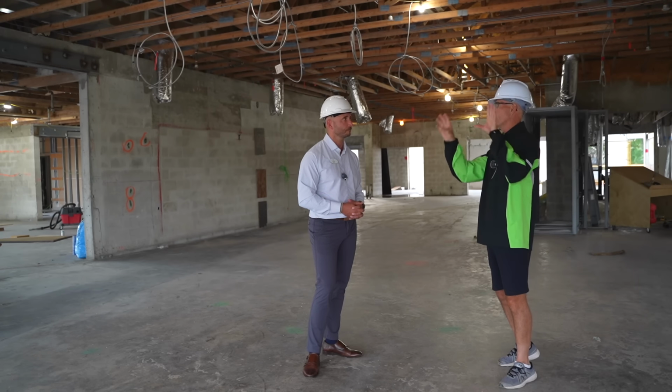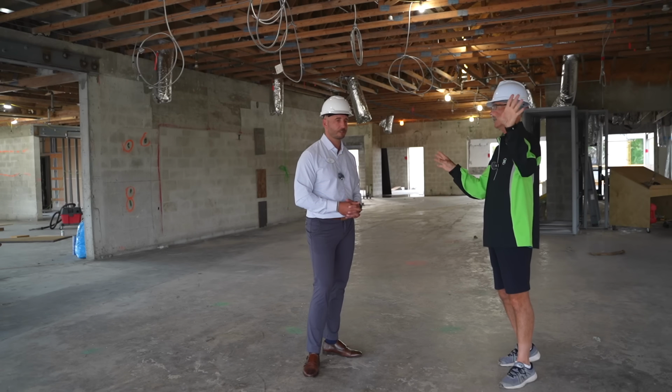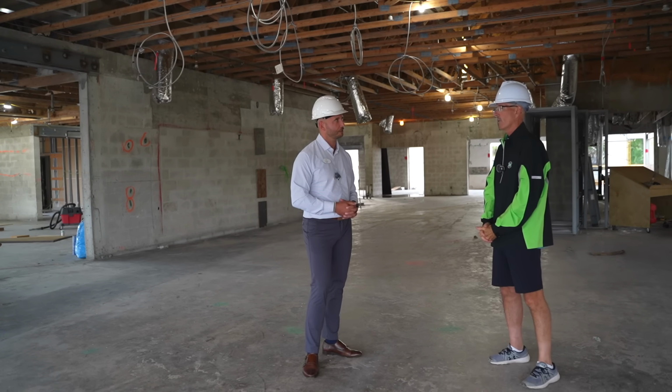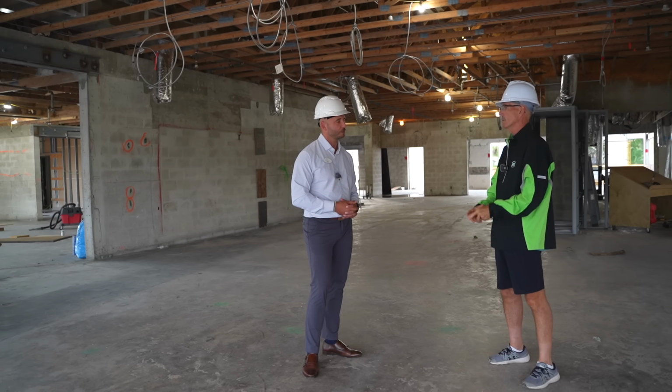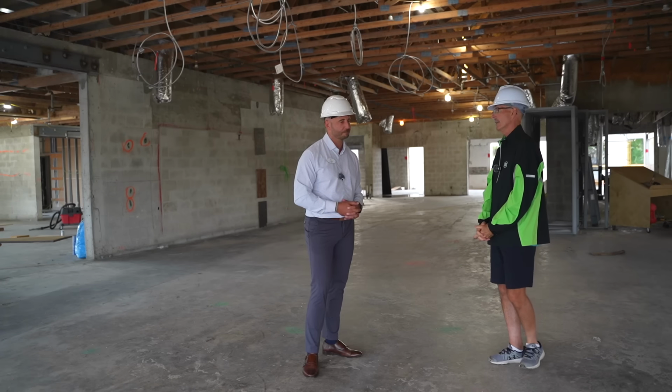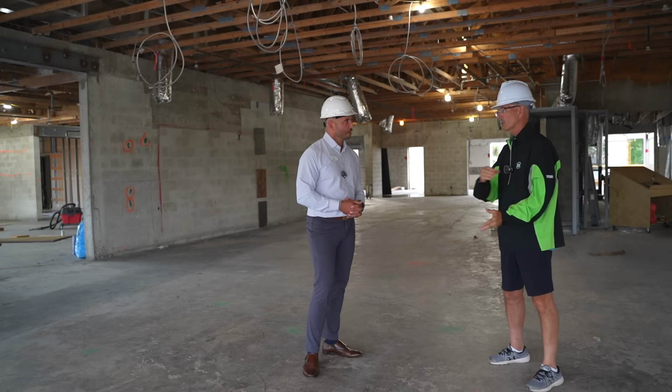We have false beam work. We have recesses. We have nice lighting. It's going to be gorgeous. So, yeah, it's a classy solution. All of that has to happen once the space is conditioned and we pull all the moisture out of it. Awesome. So that's the whole track we're on.